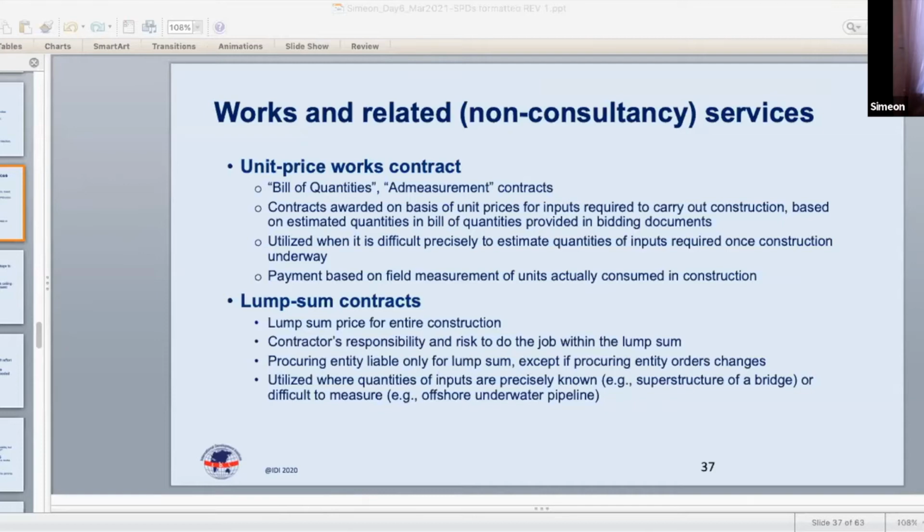Now, these types of contracts may have included in them a term as to the estimate of the total cost or some sort of a cap. Time and materials rate contracts. Again, these are contracts which establish rates for labor or other expenditure of time and materials. And again, there may be a ceiling price, which may be a hard or a soft type of ceiling, the soft one being sort of aspirational.